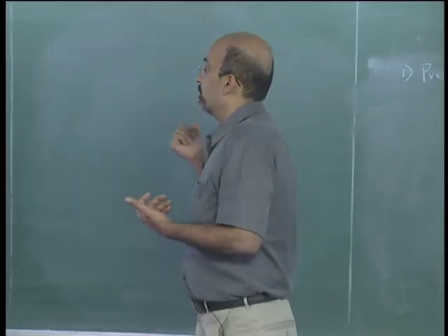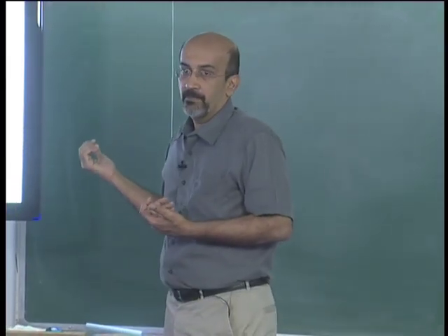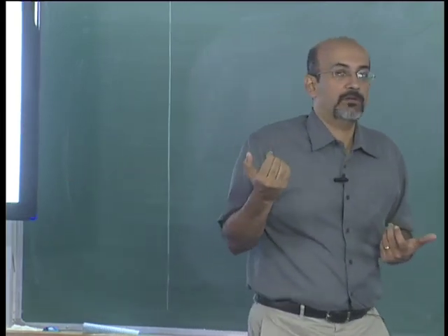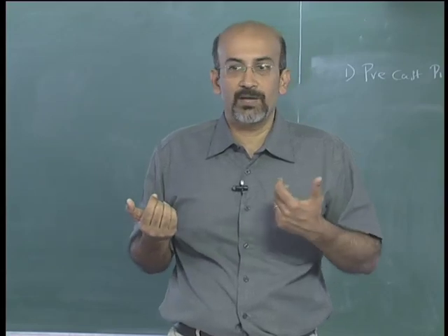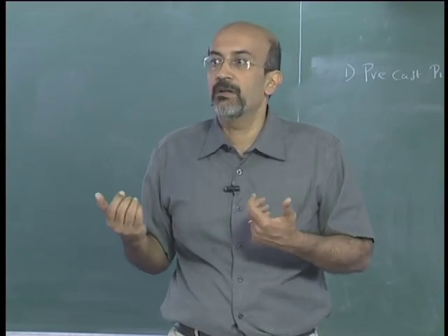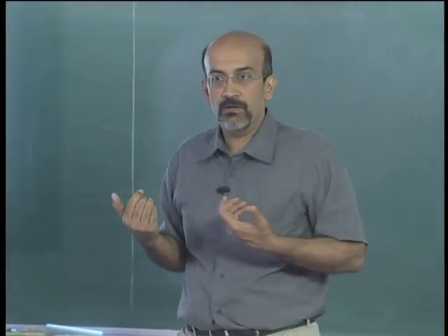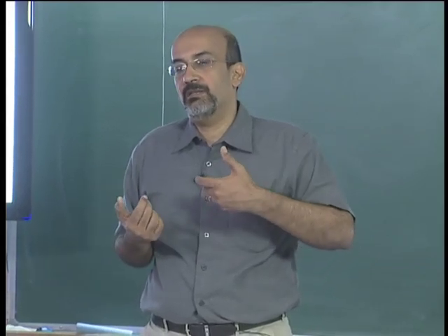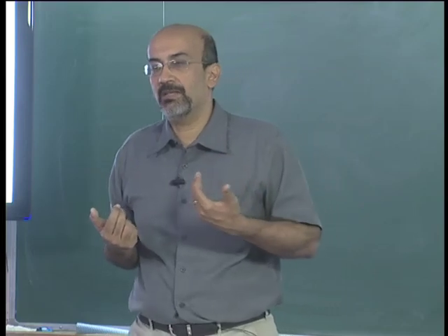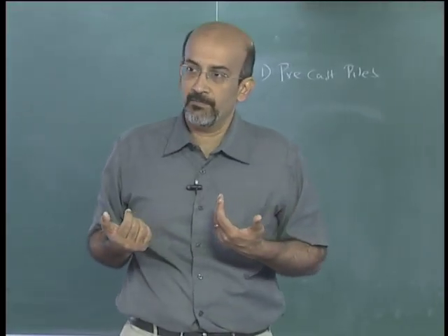Coming back to this issue of detail, remember we talked about schedule levels, level 1, level 2, level 3, level 4, level 5. The detail you go into also depends on the level of the schedule you are working with. Sometimes, when you are in the beginning and at the higher levels, there is no meaning in going into too much detail.